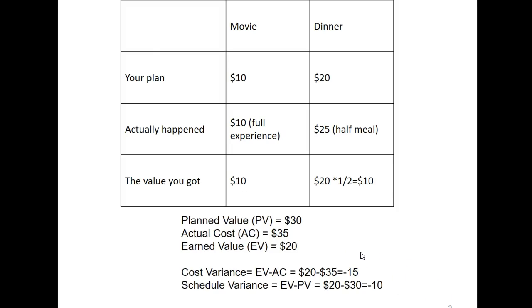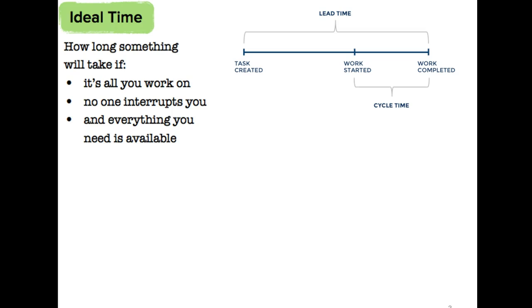These are the numbers we did. So I did a quick discussion of ideal time. This is one learning concept on your learning backlog. It's the time that you would spend on a task to complete it if everything in the world was perfect. Technology was perfect, people were perfect, network was perfect, sponsors, stakeholders, everybody worked perfectly, and that's how much time you need to complete a task.